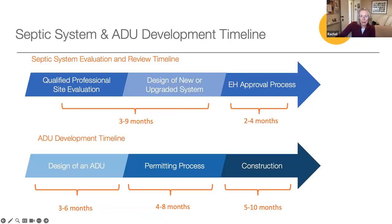The timeline. We think it's important to share this estimated timeline so you can better understand the investment in time required when thinking about a potential project of this size. Conservatively speaking, the time to evaluate, design, and approve a new septic system — and then subsequently the timeline for designing, permitting, and constructing the ADU — can be three years. Be aware that timing is contingent on the availability of busy professionals in a very active construction industry. Also note that the timeline for permitting can fluctuate seasonally, as some times of the year see far more applications than others.